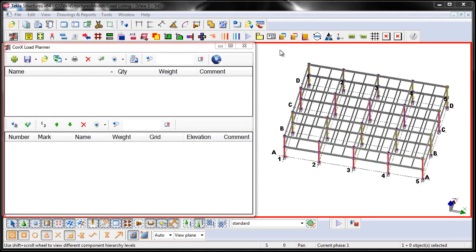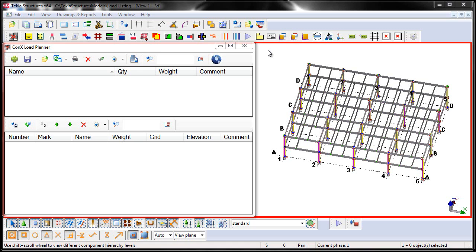In this video, I'm going to demonstrate using the Connex Load Planner tool. The Connex Load Planner tool allows erectors as well as project managers to easily use the weight, piece mark, and location information of the objects in the Tekla Structures detailing model to easily plan truck loads.